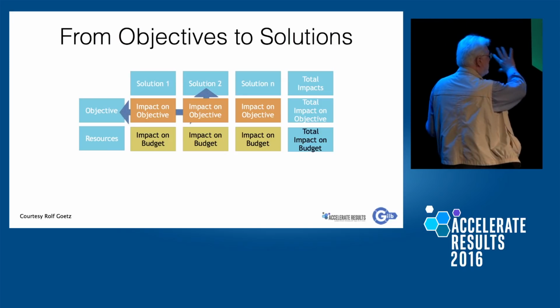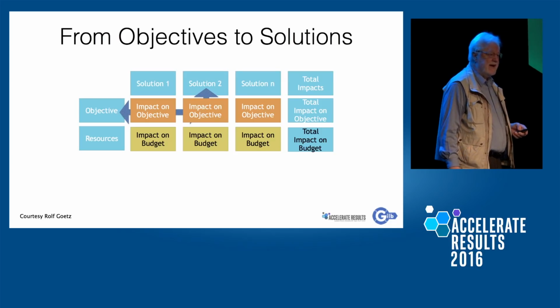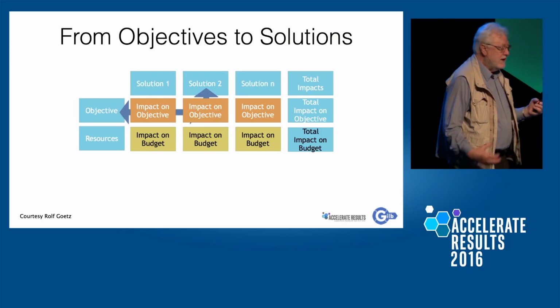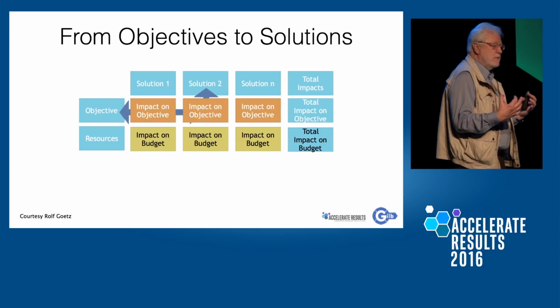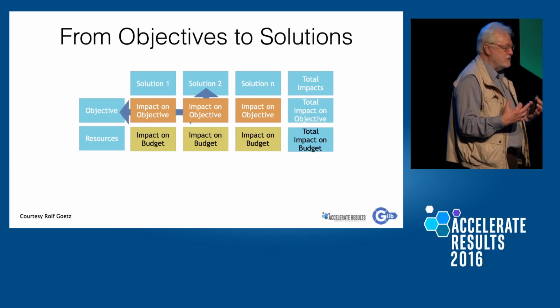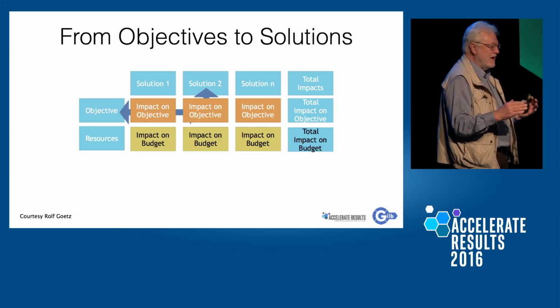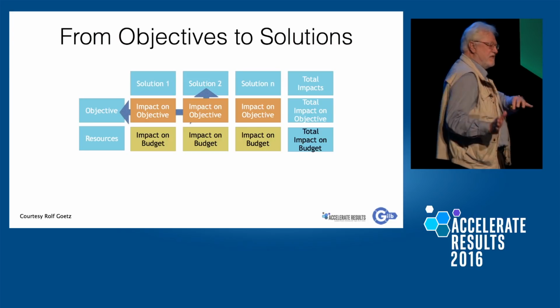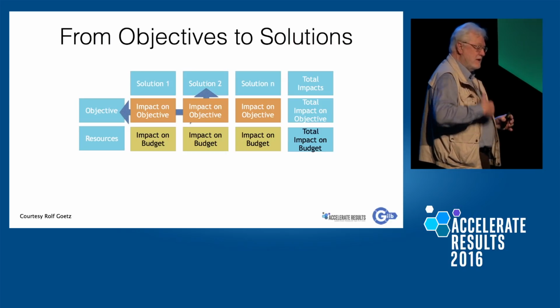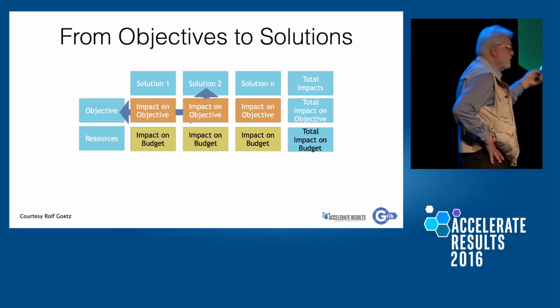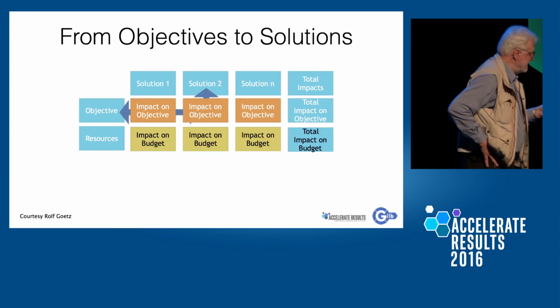Okay. Once you've got these numbers in there, you can total them out the other end and get things like, do we have a safety factor? Have we got more potential value than we actually need? Safety factor 2 is a very good engineering heuristic. Safety factor 1, bad idea, because if anything fails, you're going to fail. Okay, so we systematically look at the idea of safety factors and whether we're overrunning budgets and things like that.